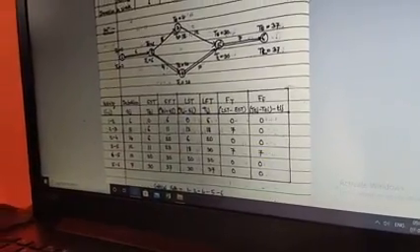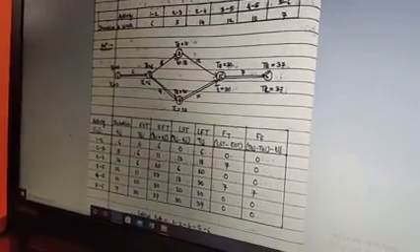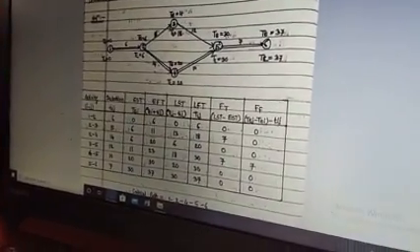Now going to the next, 4 to 5, again the number is 30. And again, how has this 30 come? Again, it is very simple. 6 plus 14, 20. 20 plus 10, 30. That means after spending 30 weeks, I am going to reach this particular stage.